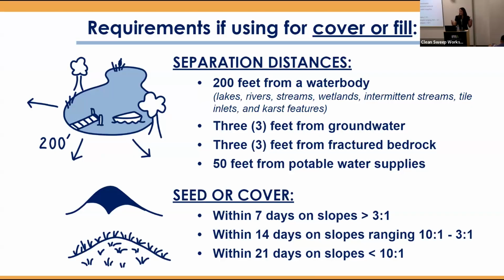And then if you have this fill and this cover, you need to seed it. So within 7 days on slopes that are 3-to-1, 14 days on slopes that are a little bit less steep, from 10-to-1 to 3-to-1, and 21 days on slopes that are 10-to-1 or less than 10-to-1. So just some general know-how and guidance for that. But it's really just common sense.